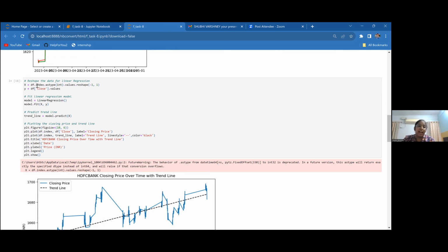The first model is the waterfall model. In the waterfall model, the first step is requirement and design, and after that come development, testing, deployment, and maintenance. It is very easy, and it progresses through the phases in a linear and sequential order, with each phase building upon the previous one. If the first phase is completed, then we do the next phase, and we need well-defined and stable requirements before starting the development.